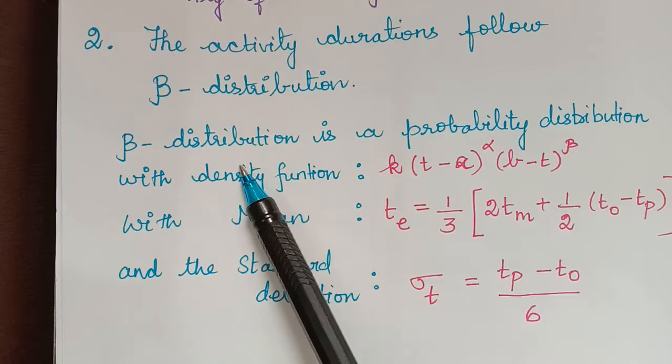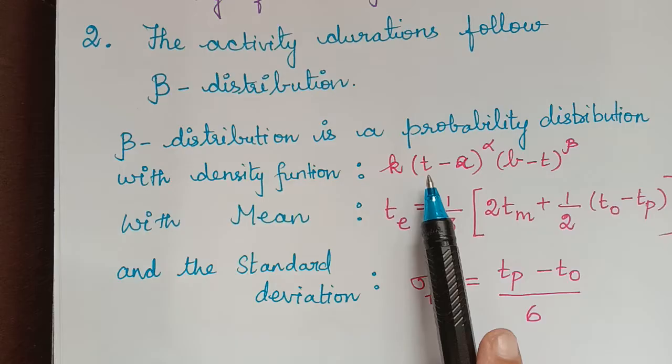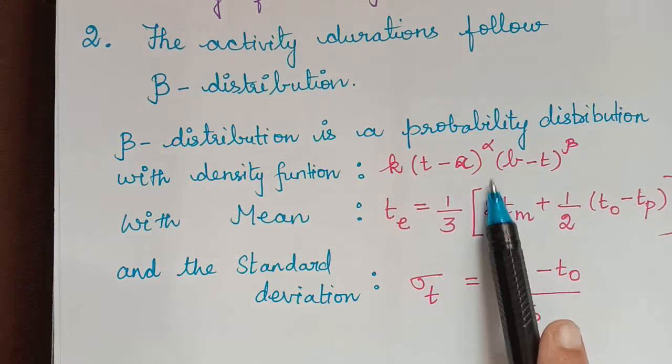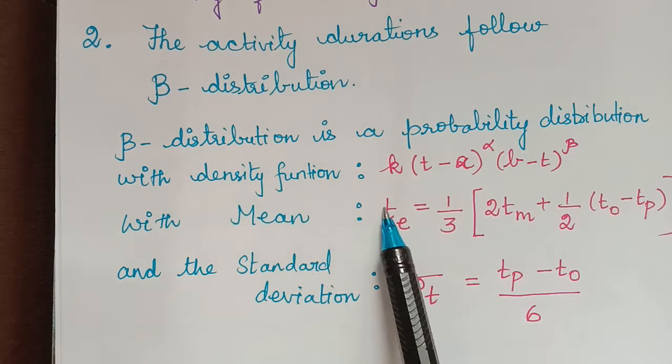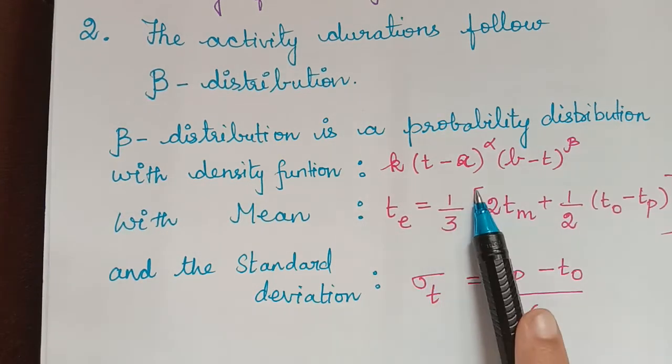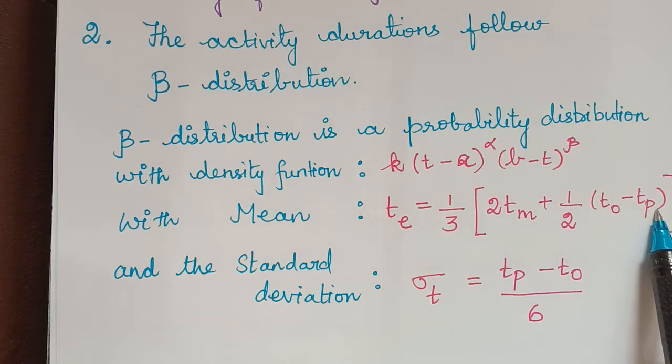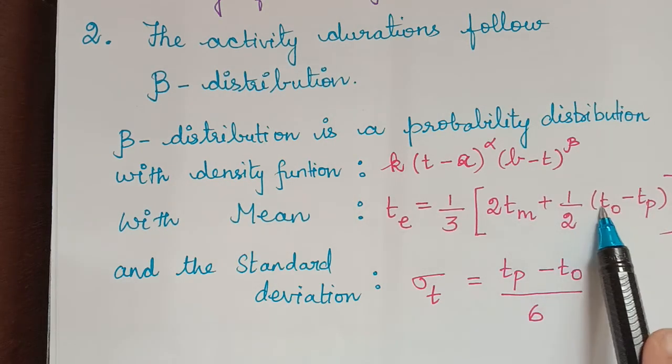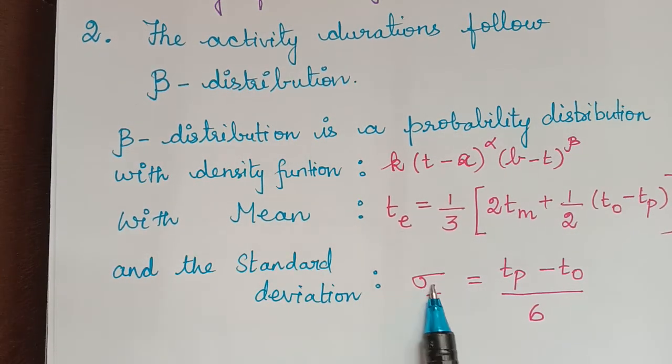So what is this beta distribution? It is a probability distribution with density function k(t-a)^α(b-t)^β. And the mean of beta distribution is te = (1/3)(2tm) + (1/2)(to-tp), where to stands for optimistic time, tp stands for pessimistic time, and tm stands for most likely time. And the standard deviation is given by σt = (tp-to)/6.